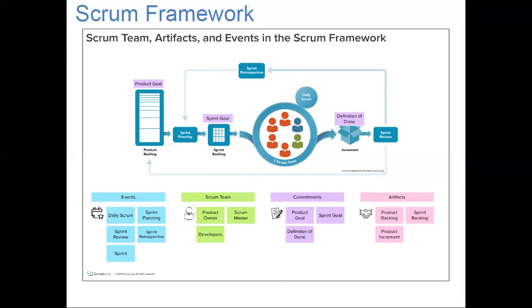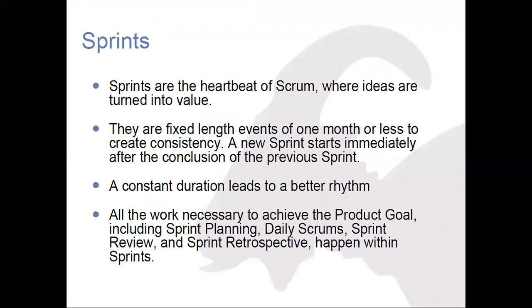Okay, so let's move ahead. Also, what is the sprint? Sprints are the heartbeat of Scrum, where ideas turn into value. They are fixed length events of 1 month or less to create consistency. A new sprint starts immediately after the conclusion of the previous sprint. There is no gap between 2 sprints. The duration of the sprint should be constant, so we will have a better rhythm.